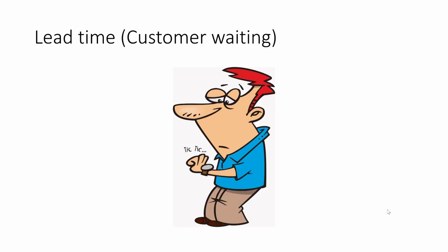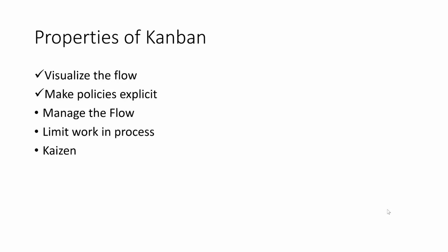So it's not just adding up the cycle times of each of the steps in the process, but also acknowledging the fact that, yeah, that's our cycle time, but there's 4 things in process at any given time. So each one of those 4 things in phase 1 has to get done first before mine gets worked on, and then it moves over to the next column. See how that works? So it's actually the cumulative cycle times, the sum of the cycle times, times the number of pieces in process, as long as the pieces are all the same size.